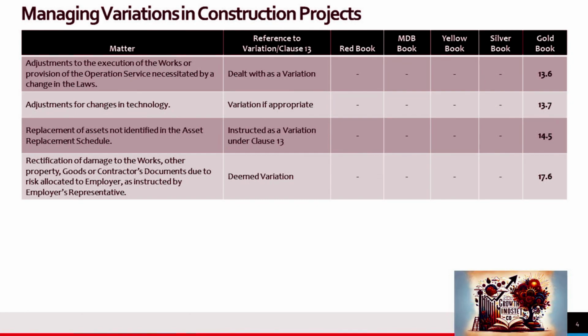14. Adjustments due to legal changes. This is a specific variation dealt with in the gold book under subclause 10.6, reflecting adaptations to changes in law. 15. Technological changes requiring adjustments, managed as a necessary variation in the gold book under subclause 13.7, accommodating technological advancements.